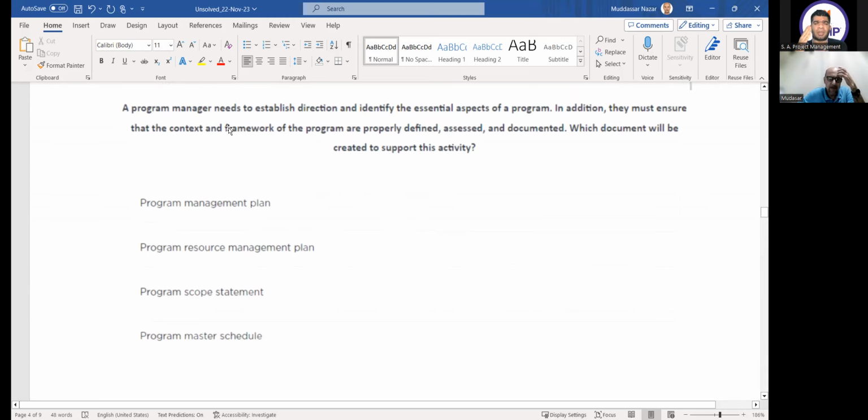It's asking about the first thing that you need to make. And from chapter number 8, remember, we are making the program formulation activities. Under the program activities, we have scope as the first thing, then schedule, cost, resource, communication, procurement, stakeholder. Now you understand the importance of the sequence that I made. In the book, the change management plan is first, then the information was completely mixed up. But the sequence that we have is very important for giving the options also. First step is to clarify the scope, then schedule, then cost. So here the program scope statement is the correct answer.